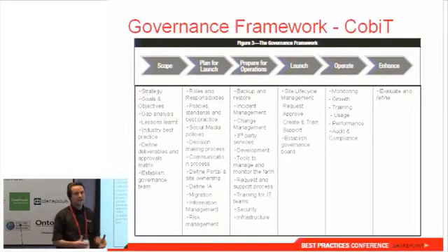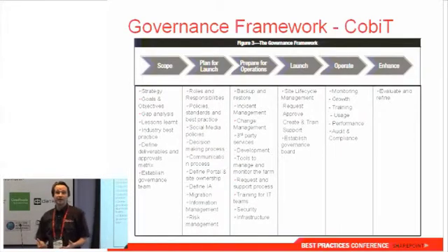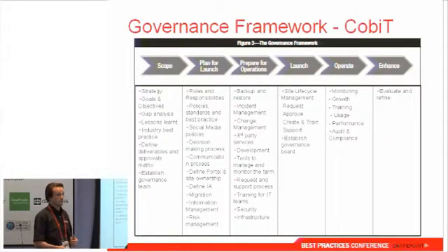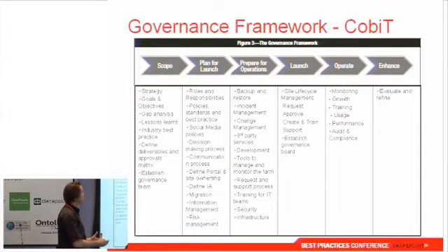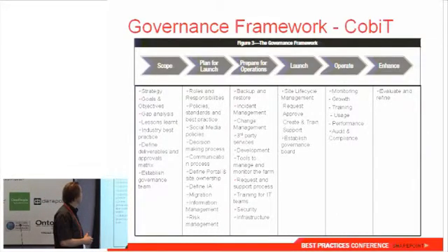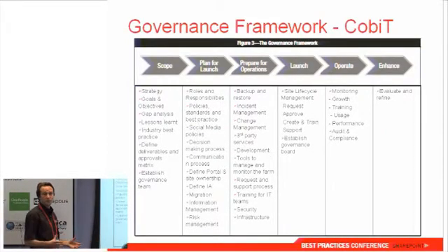We did a gap analysis. What governance is already out in the organisation? There was a huge amount already in Kellogg's, and we didn't need to rewrite it. So we took the policies and then just created some SharePoint best practice, some SharePoint principles around those policies. That saved us a huge amount of time. We looked at lessons learned from other projects, industry best practice, and then looked at our deliverables and our approvals matrix for all the work we did.